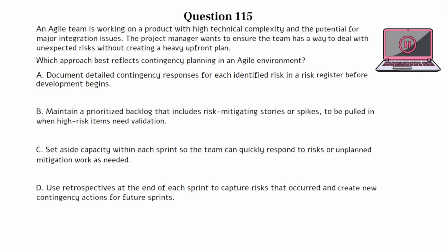The correct answer is B. This question tests your understanding of how Agile teams handle contingency planning without heavy documentation. Instead of trying to plan every possible risk response up front, Agile teams build contingency directly into the backlog so mitigation work can be prioritized alongside features.